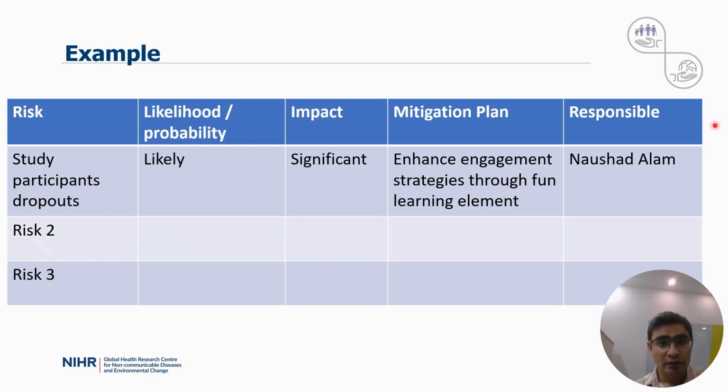As a rule, review this monthly to ensure preparedness and quick action if a risk arises. However, those risks with high probability and high impact should be reviewed and monitored more closely on a weekly basis. Please refer to the TGI risk management plan available on GWIS and report.